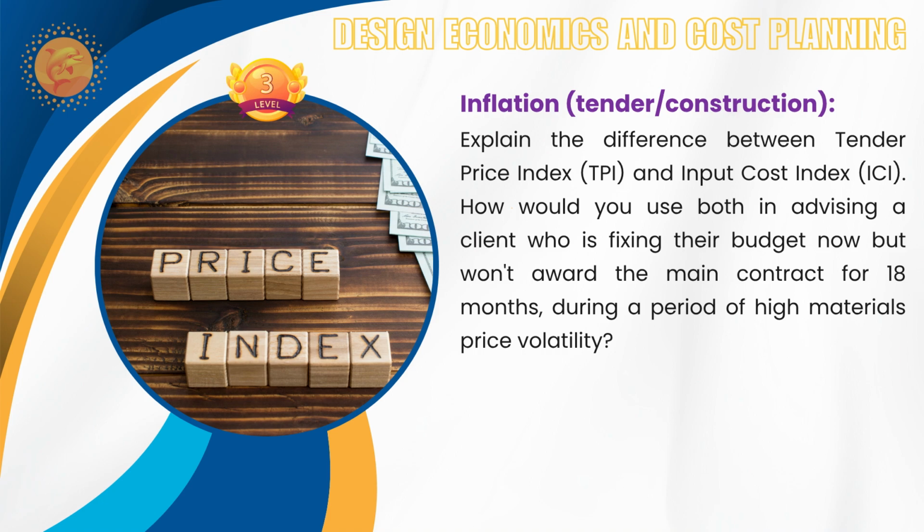So you will see the trend analysis of the input cost index, which will be taken into consideration for high material price volatility. And the tender price index, again, you have to follow, because with BCIS in a UK kind of environment, everybody discloses their pricing details to the public and all is open. But that is not the case in the Middle East or in the Asia Pacific region. So we have to take into consideration your own experience from your previous projects.